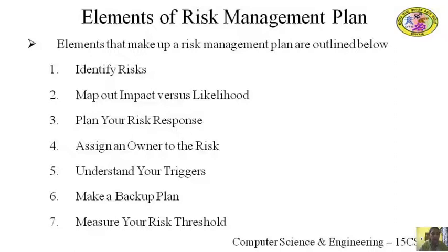Risk identification occurs at the beginning of the project as well as throughout the project. While many risks are considered known risks, others might require additional research to discover. To identify risks, create a risk identification checklist that is specific to your project type. You can do this by interviewing all stakeholders and industry experts.